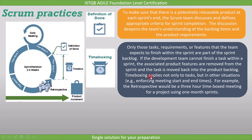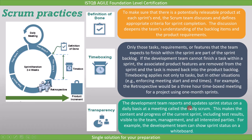Time Boxing applies not only to tasks, but in other situations as well — for example, enforcing meeting start and end times. For example, the retrospective would be a three-hour time boxed meeting for a project using one-month sprints. The last practice is Transparency. The development team reports and updates sprint status on a daily basis at a meeting called the daily scrum. This makes the content and progress of the current sprint, including test results, visible to the team, management, and all interested parties. For example, the development team can show sprint status on a whiteboard.